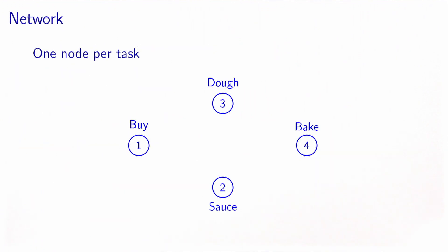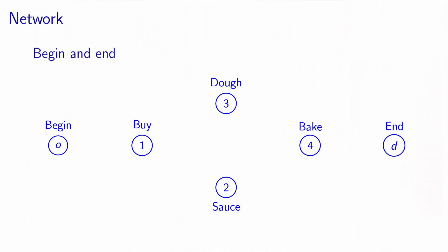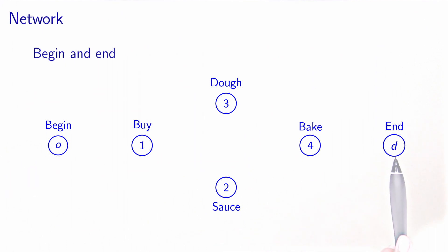We will model this problem using a network where each node represents a task. In our pizza example, we have four nodes — one for each task. We also add two extra nodes: one representing the beginning of the project, denoted O, and one representing the end, denoted D. So if we have n tasks, we have n plus two nodes in the network.